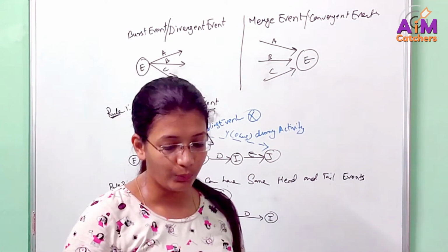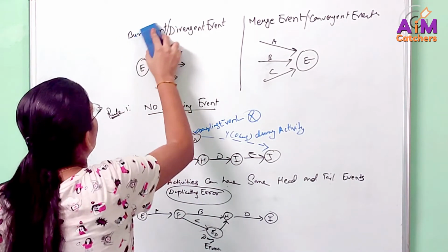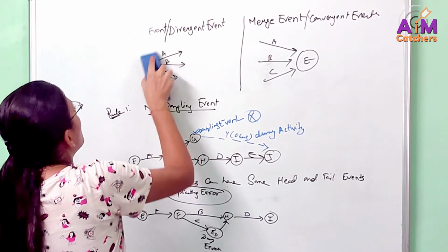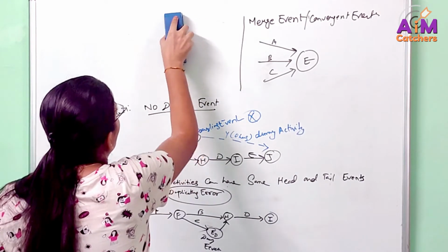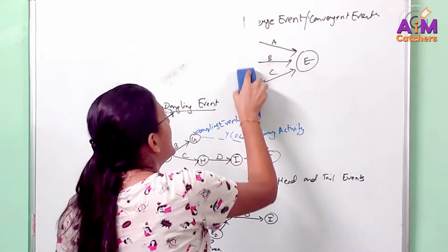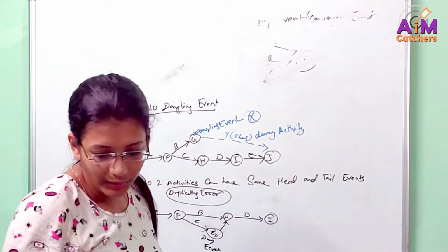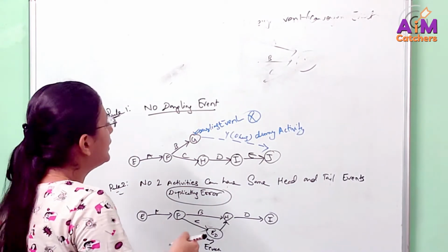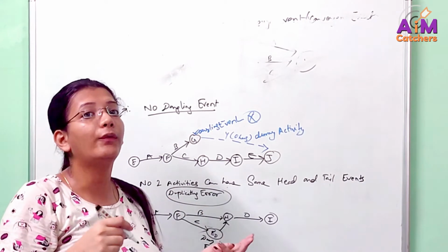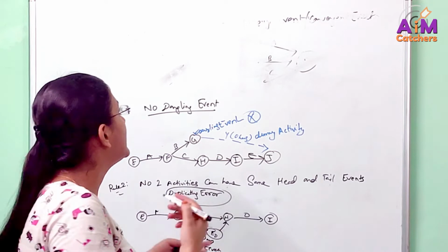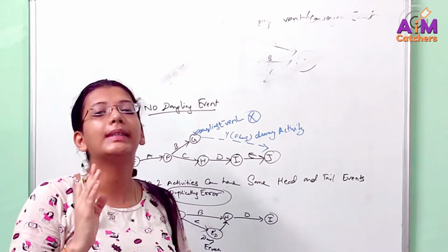And the last rule, which is the most important one, is a mistake that we mostly make. This is a very common mistake. What is it? Any succeeding event should not have a number less than the preceding event. Didn't get it, right? If we number the events as 1, 2, 3, 4, then event number 4 should not go before event number 3. So any succeeding event should be either after the preceding event or just in the same line.